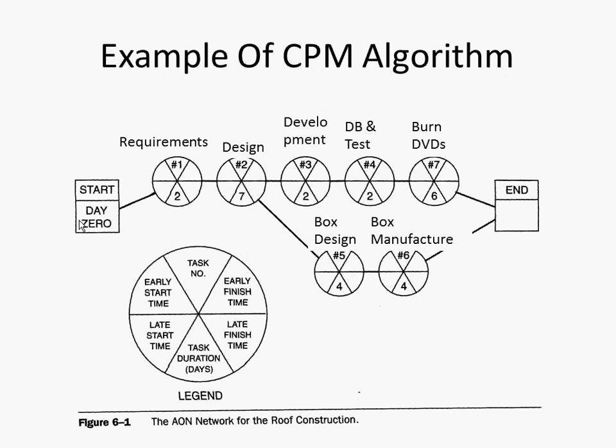19. We have some slack, we have some latitude here. We could finish it as soon as 17, but we don't have to, right? We have some give. Does that make sense? We could actually finish it as late as 19. It's not going to delay the whole project. Why not? Because it's waiting on the other task. We could work our butts off to finish it at time 17, but we don't have to. We still are going to wait 2 more days for this guy. So the latest that this could finish would be time 19 without delaying the whole project.